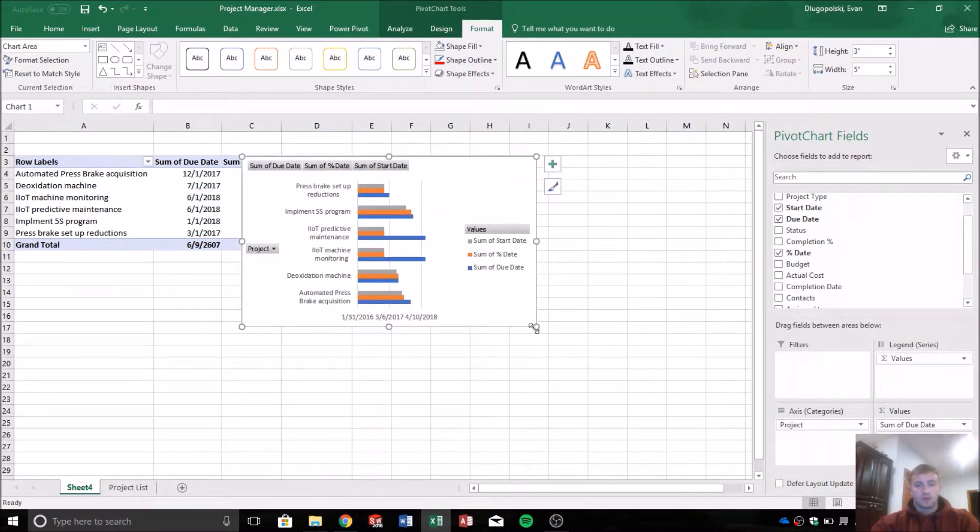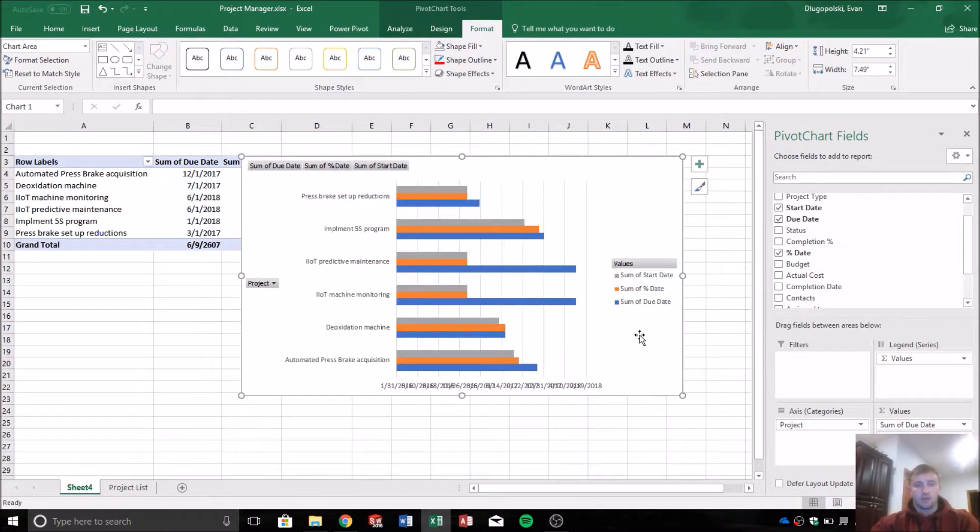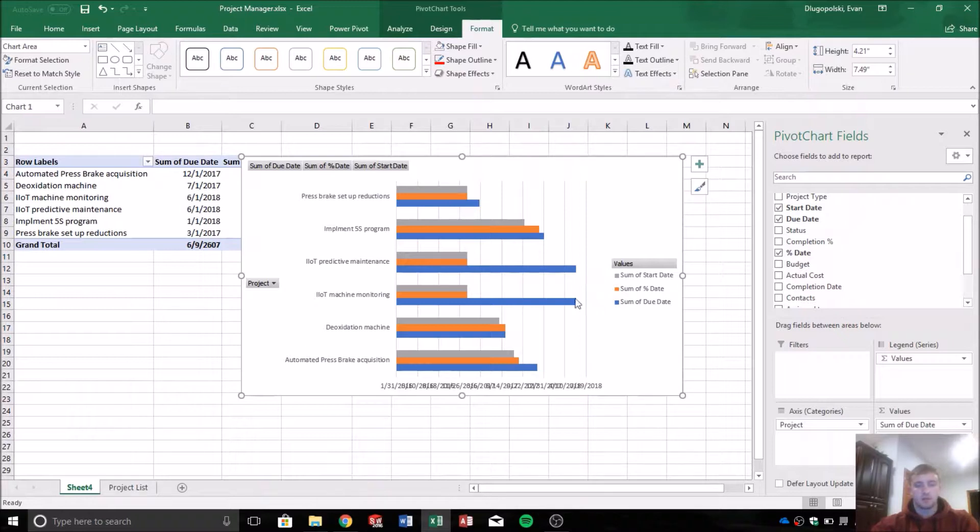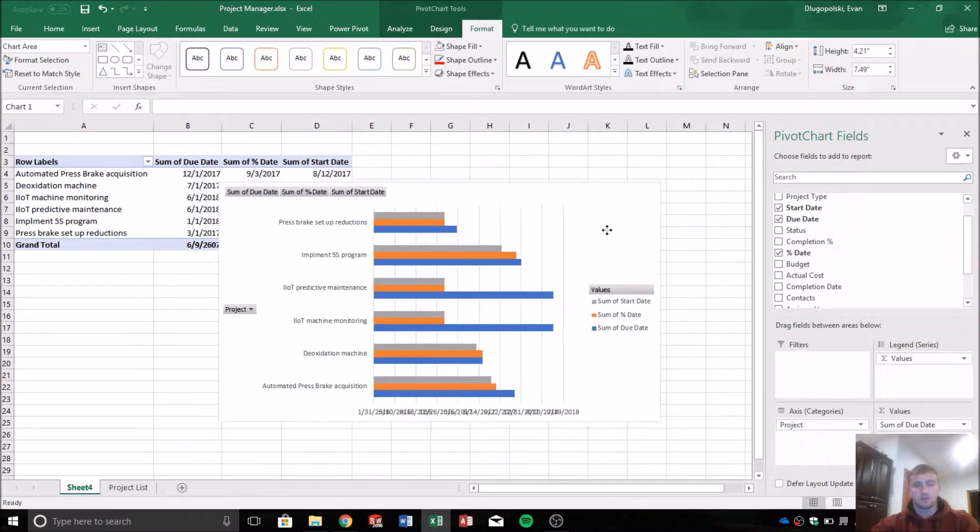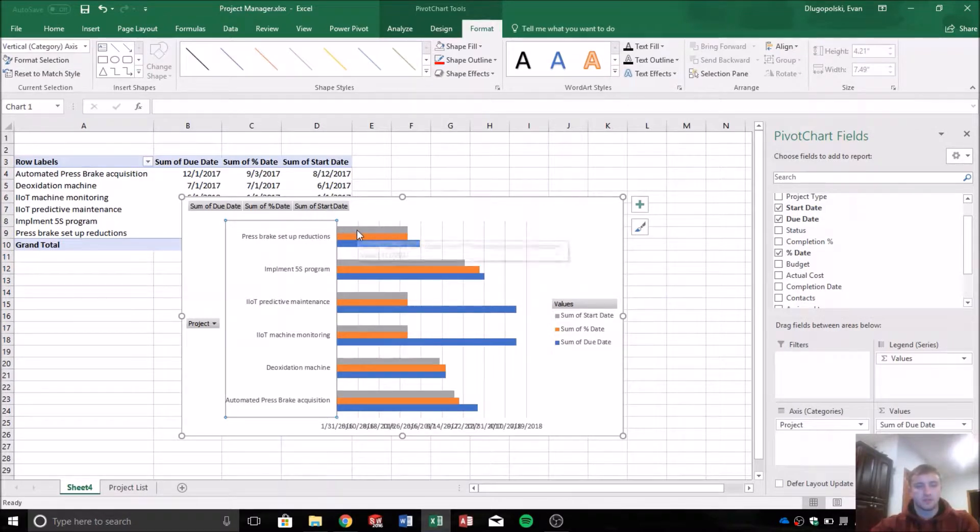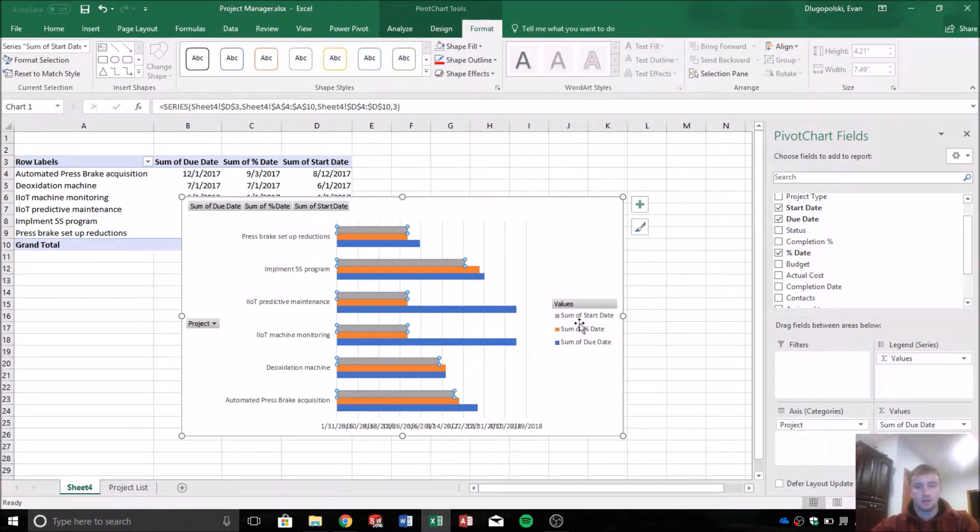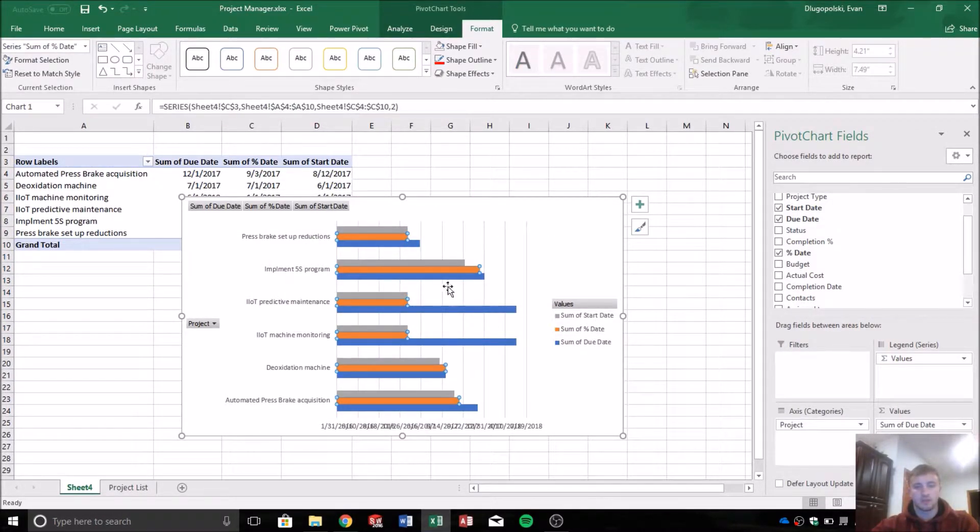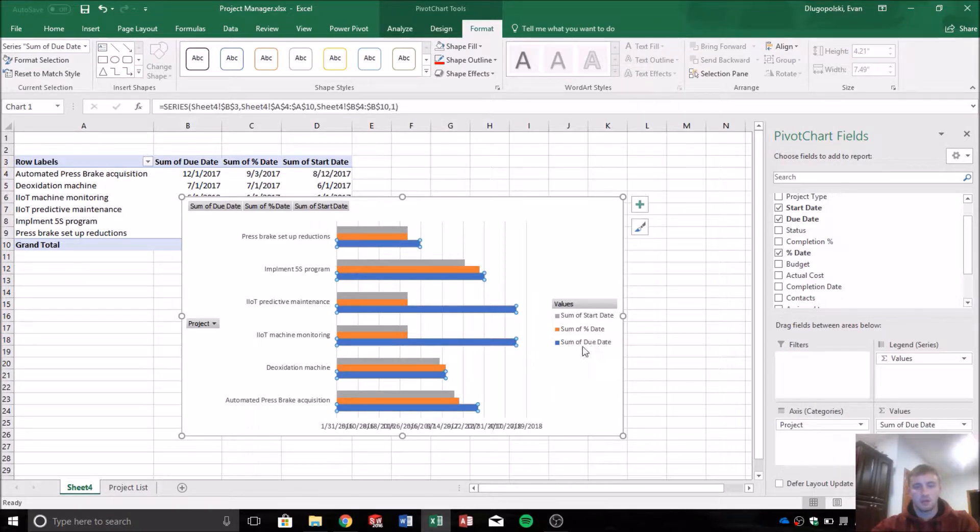So that gives us a graph that's tied to our pivot table, which is tied back to our project list. So here we can see each project, and then the start date, the percentage completion date, and the due date for each project.